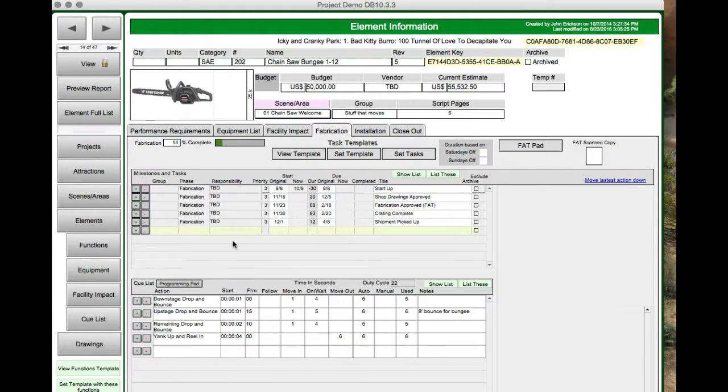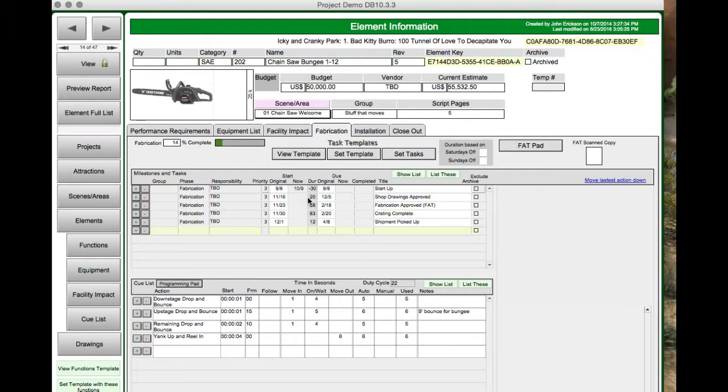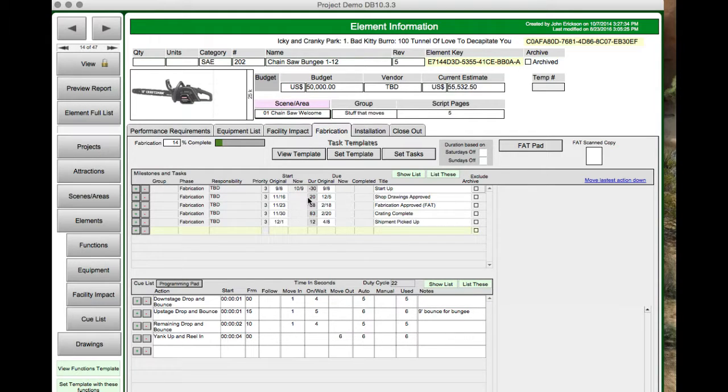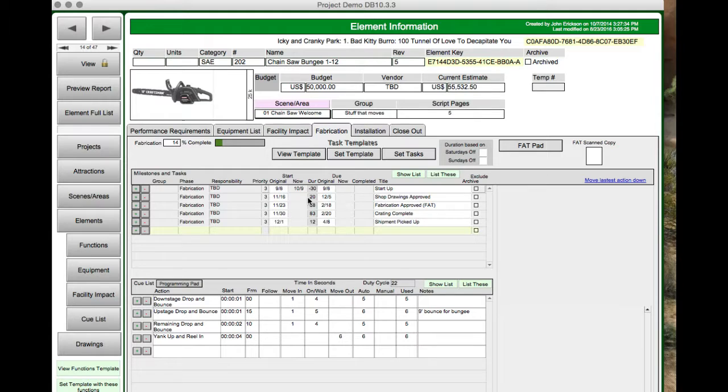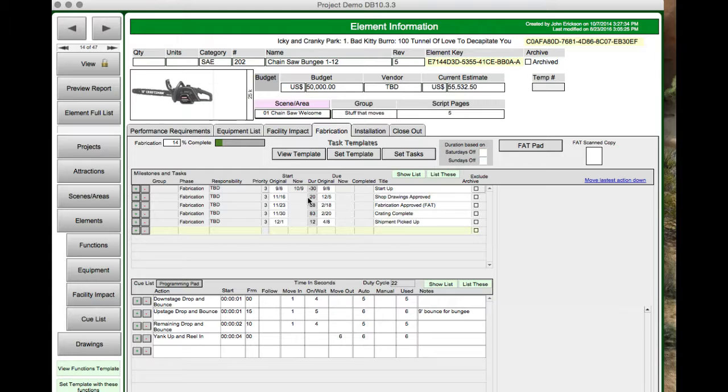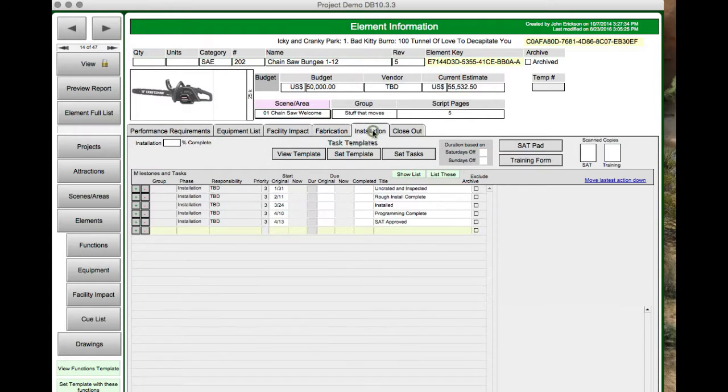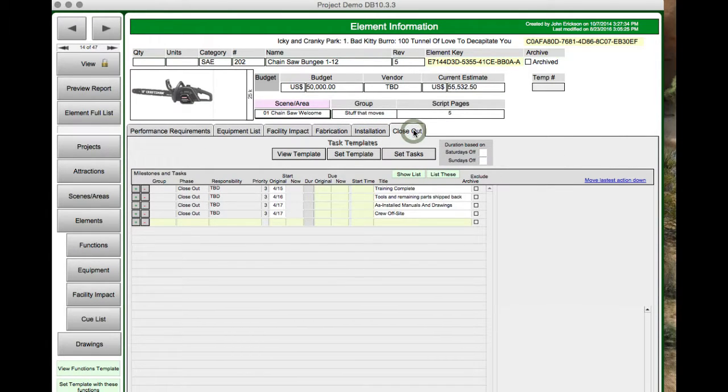When you get to fabrication, you're mostly just tracking milestones and tasks. This I keep separate from the schedule. The attraction schedules or the project schedules are usually anywhere from a couple days to a couple of weeks, even up to a couple of months behind. So this is what I do to keep track of what I have to get done on any given day. You can set up your cue list here. Installation is the same thing, tracking milestones and tasks. And the same with closeout.